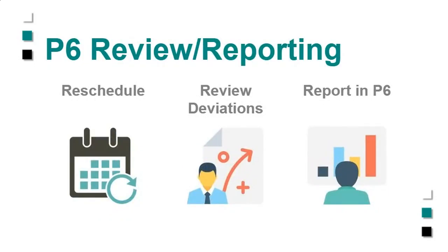We also have the ability to fill in whether you need a deviation or a change order, and start to communicate that way from the app to the people approving, either in P6 or within CAPS itself. What we tried to do was take best advantage of what P6 already has in it, what most schedulers are already doing with codes, user-defined fields, and indicators, so that you're really just using CAPS to help streamline the updates. You're not using it as a whole other reporting engine. It's very much focused just on getting the updates in quickly.